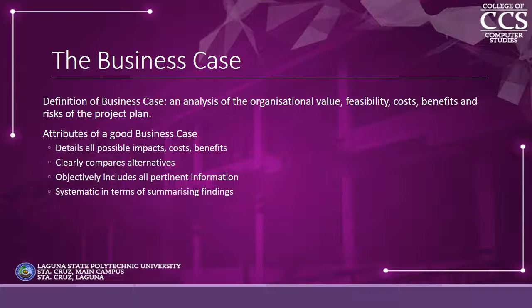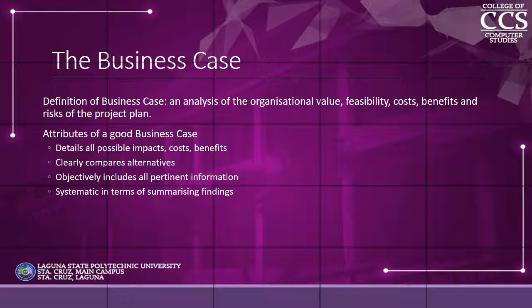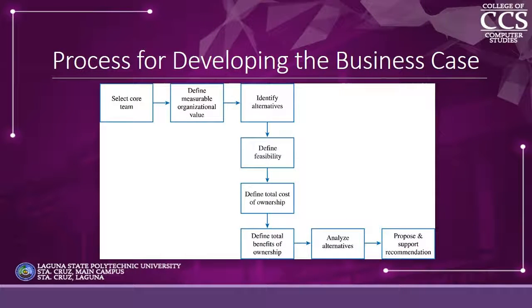A business case is an analysis of the organizational value, feasibility, costs, benefits, and risk of the project plan. The attributes of a good business case: it must detail all possible impacts, costs, and benefits. It clearly compares alternatives. It objectively includes all pertinent information. It is systematic in terms of summarizing findings.